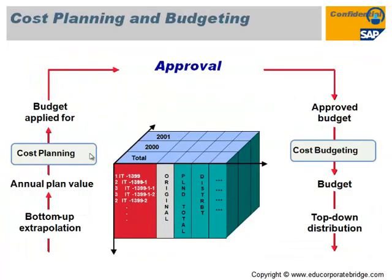This diagram shows plan versus actual. Planning starts at the bottom as exploration, then annual plan values and cost planning are done. Then a budget is applied, and once approval is received the budget is approved and distributed to lower-level WBS elements. Budget can be controlled year-wise — for example, over a 6-year project span — and the remaining balance budget at the end of a financial year can be carried forward to the next financial year in SAP Project System.